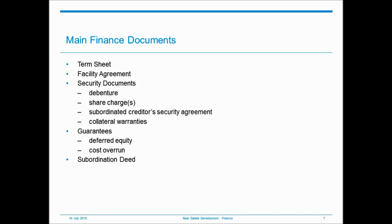There are of course a wide variety of other documents which might be part of any deal structure — for example, different types of guarantee such as completion guarantees, interest shortfall guarantees, or even straight financial guarantees of some or all of the loan. And where there are hedging arrangements — perhaps imposed by the bank — that brings a whole additional set of documentation.